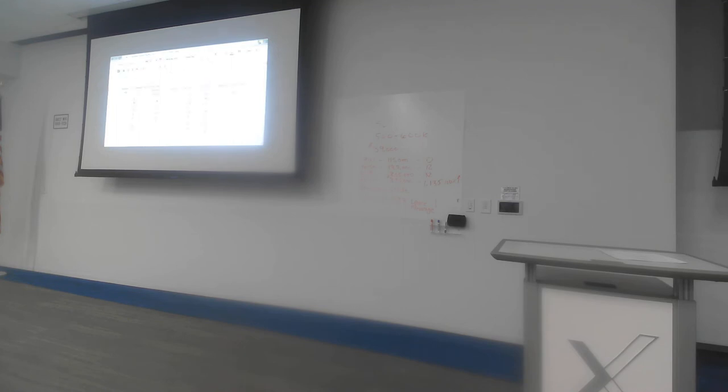And if I went and I crashed E, and I went down here to my table that keeps track of all my paths, this critical path would reduce from 15 down to 14. But this path will stay the same. And so therefore, this path would have the largest duration. That would be the critical path. And so the overall project duration would remain at 15, even though I had crashed E by a day. So I wouldn't get my bonus, and it would be futile to do that. So now, does that mean we're completely halted or scuppered and I can't do anything else? Well, no, not exactly, but it just makes things a little bit more complicated.